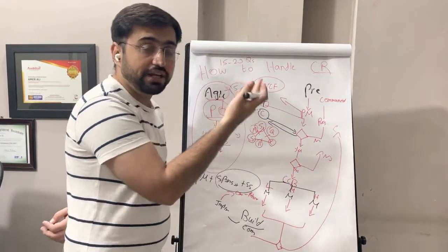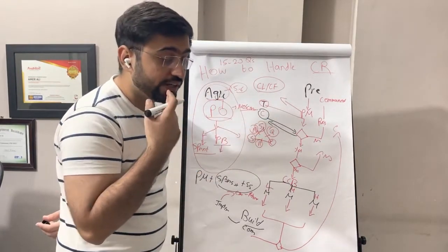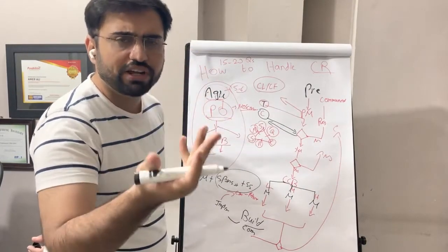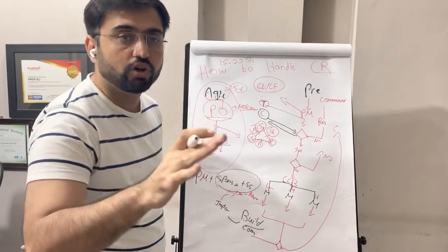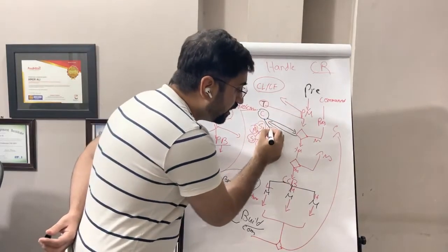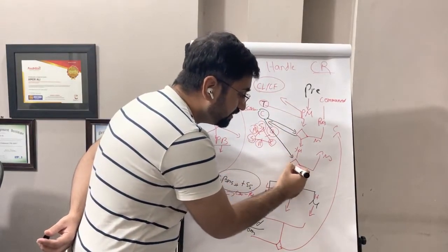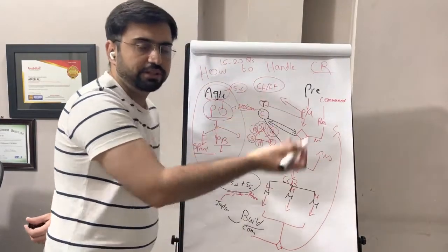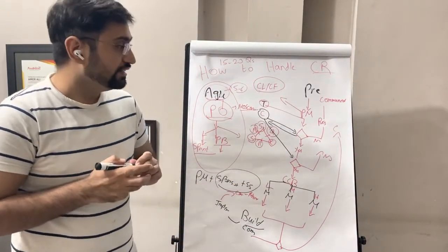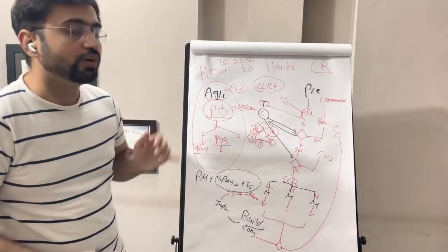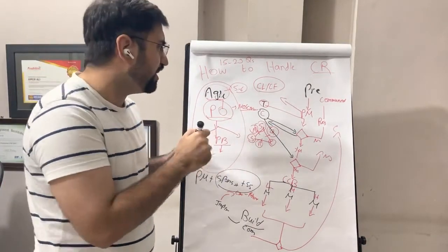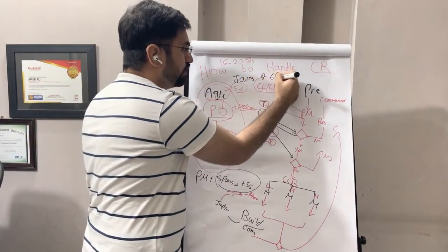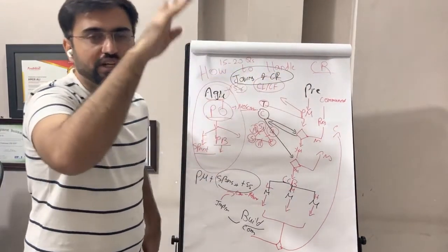The customer will analyze the change themselves. They will say, okay, maybe the change will increase the schedule, or the change will increase the scope, or whatever. So when the customer says go ahead, then the project manager, with the detailed analysis, sends that change to the change control board, and then the same procedure will be followed. This is how I call it, more of a journey of the change request, how a change follows the entire procedure.